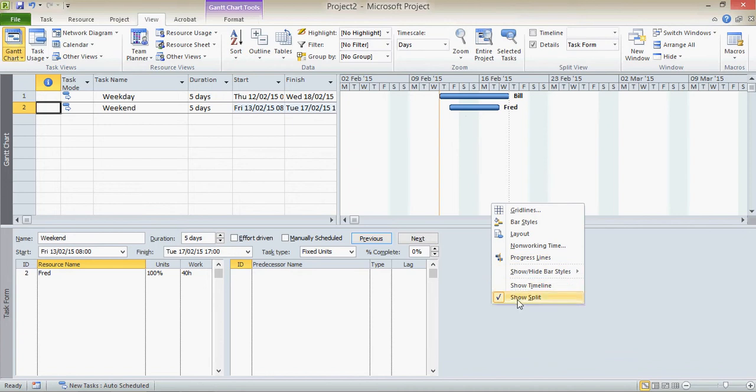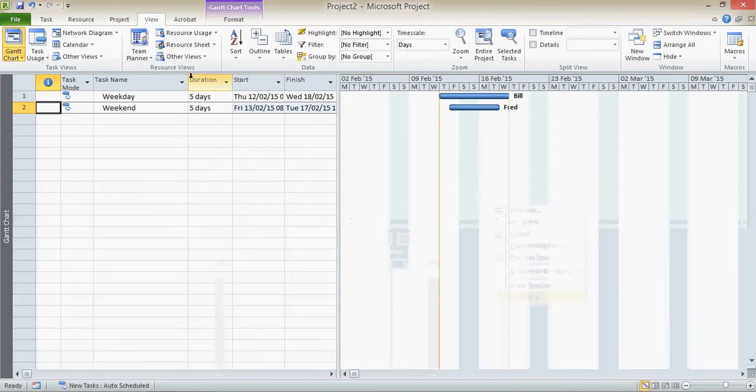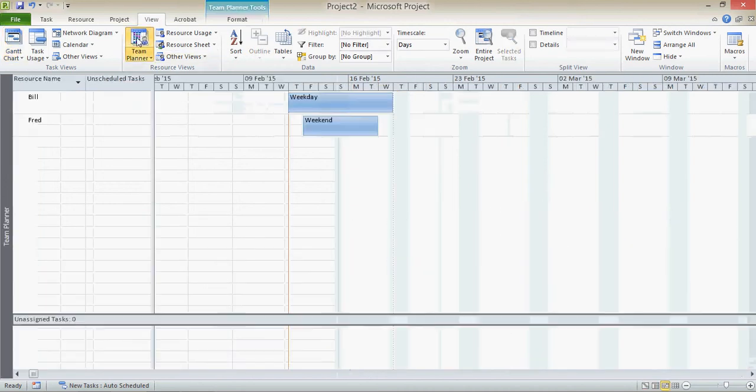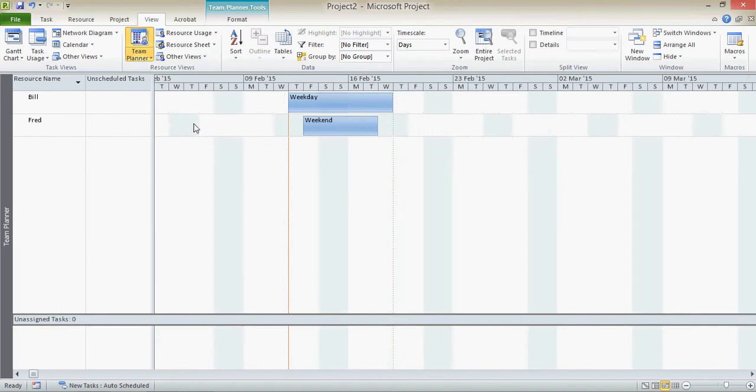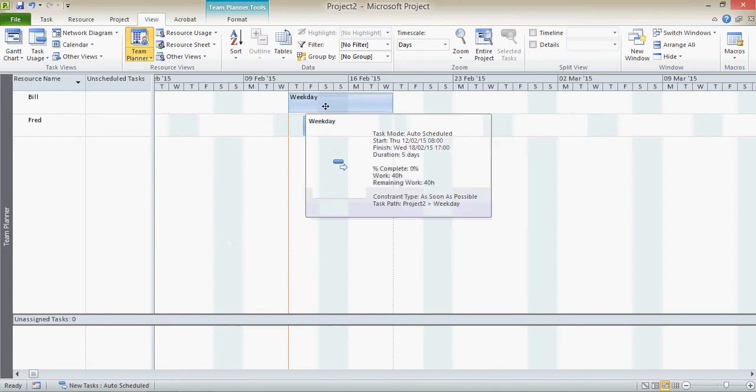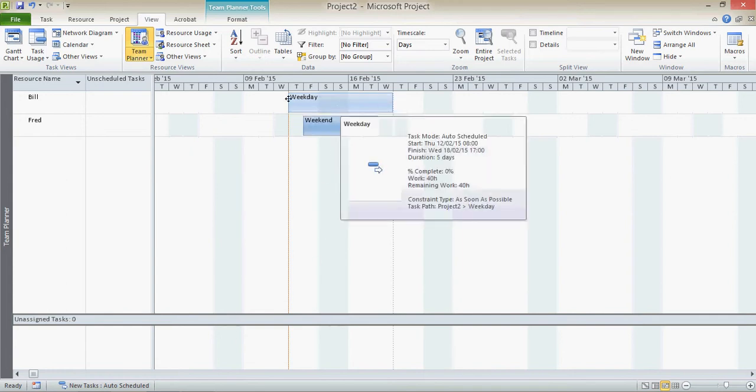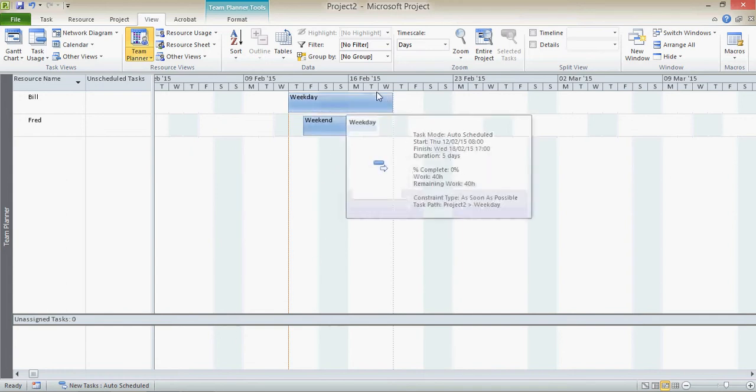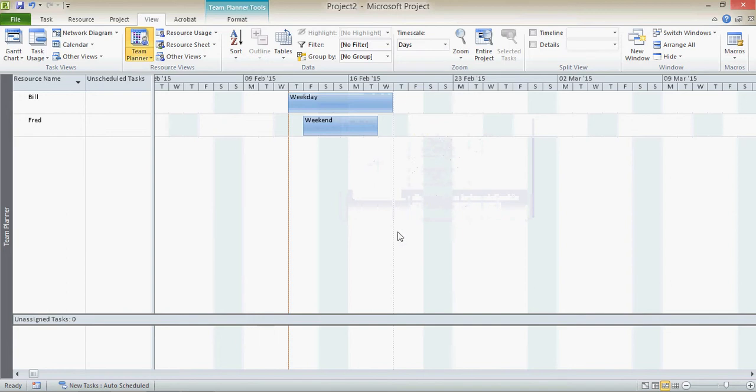So let's have a look at that in the team planner view. So we end up with the working time. And you see the weekends, the non-working time for Fred is shown differently to what it is for Bill and for everybody else. So here we have our weekday task, which in fact is spread over seven days even though it's a five-day duration. And here we have our weekend working task which is now over the five days because those are the five days that Fred is available.